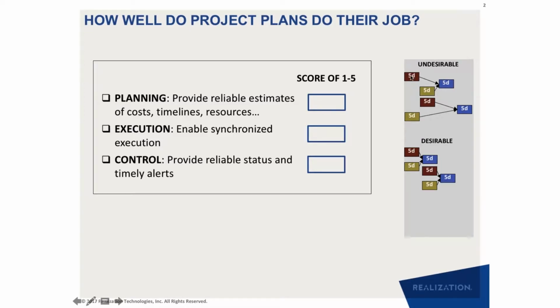When we talk about synchronization, what we mean is that the priorities of the red and the golden departments should be synchronized. If the priorities are not synchronized, meaning department red is giving priority to the project on the top and the golden department is giving priority to the project on the bottom, then both departments will do the work, but the project cannot move forward, in the sense that you cannot integrate the golden and the red outputs. You cannot perform the integration blue task until both of them are done. Of course, what is desirable is synchronization, where the golden and the red departments give the same priorities to the same projects.